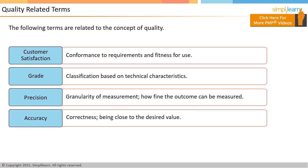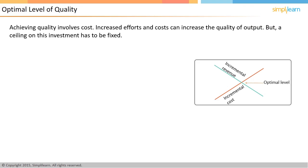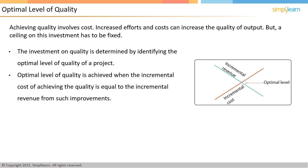In the next screen, let us understand the concept of optimal level of quality. Quality comes at a cost. More effort put into quality will give better results. However, you cannot keep on investing in increasing quality, as there is no limit to how much a product can be improved. Investment in quality is determined by knowing the optimal level of quality. As shown in the diagram, the optimal level of quality is achieved at the point where the incremental revenue from improvement equals the incremental cost to secure it.